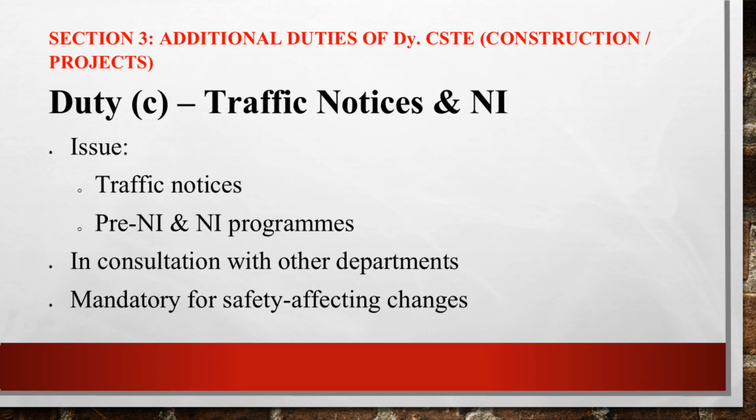Traffic notice and NA. Before altering or introducing new installations, traffic notice must be issued. Pre-NA and NA programs must be prepared. Coordination with other departments is mandatory. This ensures safe working of traffic.